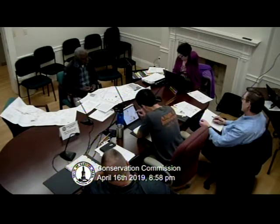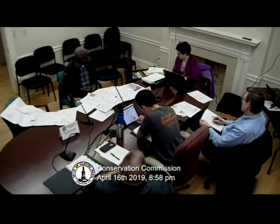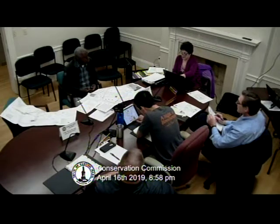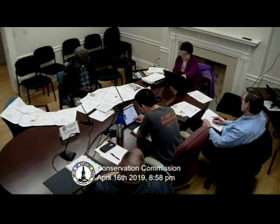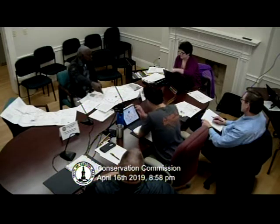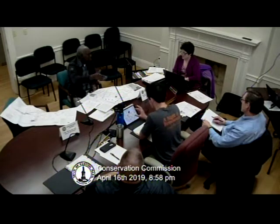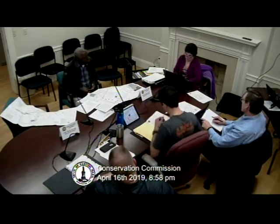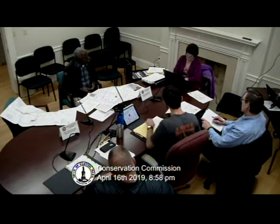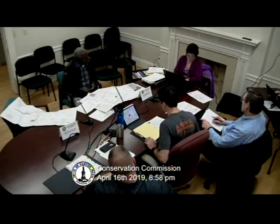I just wanted to point out that Bill Humphrey had asked the applicant's engineer to coordinate with DPW to clear the rock drain under Prospect Street. Right, remember? Yeah, so that can be coordinated when we do the bridging of that structure. And also, the water department is going to be putting in a trench in Prospect Street shortly to fix that water main, which you had already allowed.